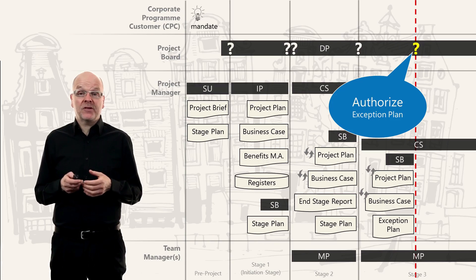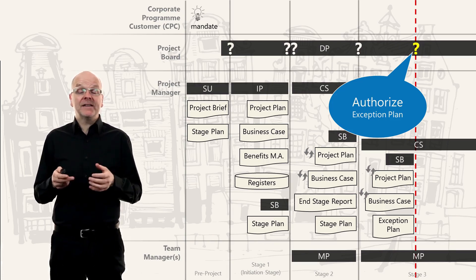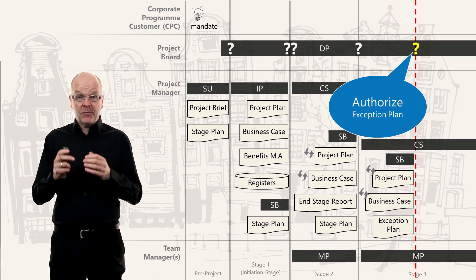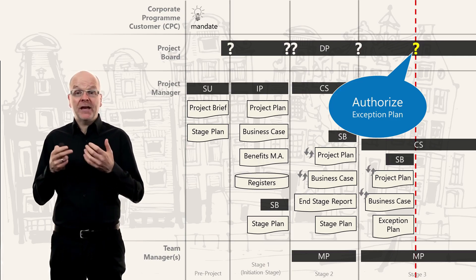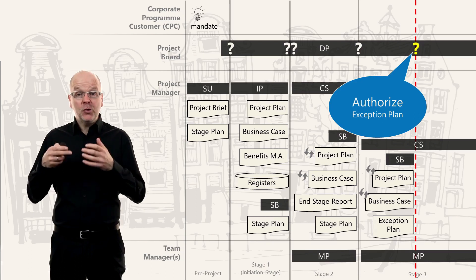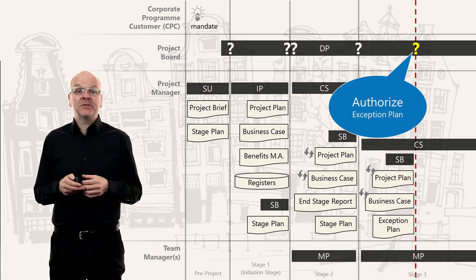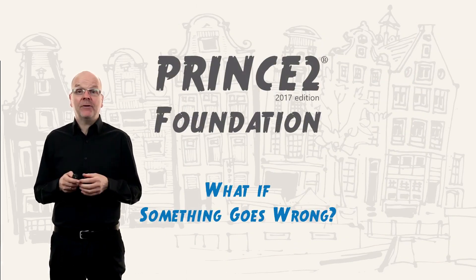So that is how the escalation process works in a PRINCE2 project: we set a tolerance, and if we go above tolerance we escalate to the level above using an exception report, then create a new plan called an exception plan to complete the current stage. That is how PRINCE2 handles something going badly wrong during a project.